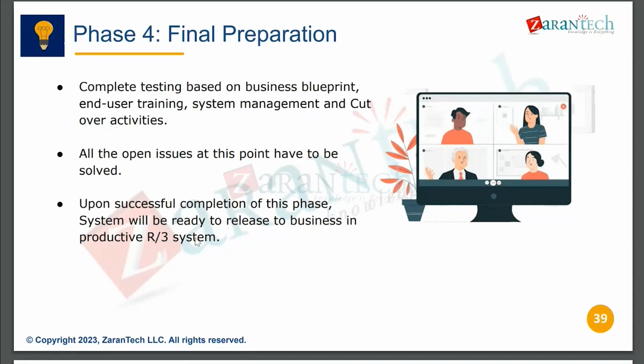Unless the business gives the go for the go live, we cannot proceed. There are instances where go live is postponed by one or two months, or sometimes more, if you miss some critical business cases. That's why this final preparation phase is very important.